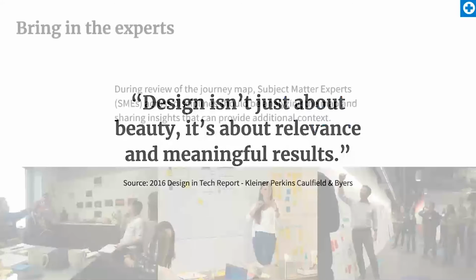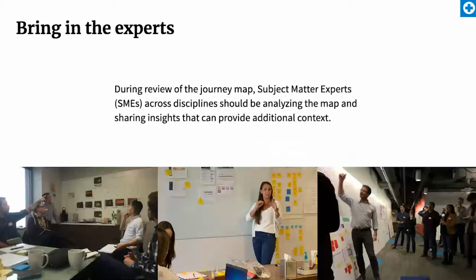After creating the initial map with your team, we like to run an exercise called Expert Talks and How Might We Statements, where you invite subject matter experts across different disciplines in your organization to analyze the map and dive deep into any critical parts of the flow. So we want to capture unique advantages, biggest risks, customer feedback, previous efforts, and technical feasibility. This not only helps to uncover more insights, but involving key stakeholders allows them to feel heard and also have a hand in the process.